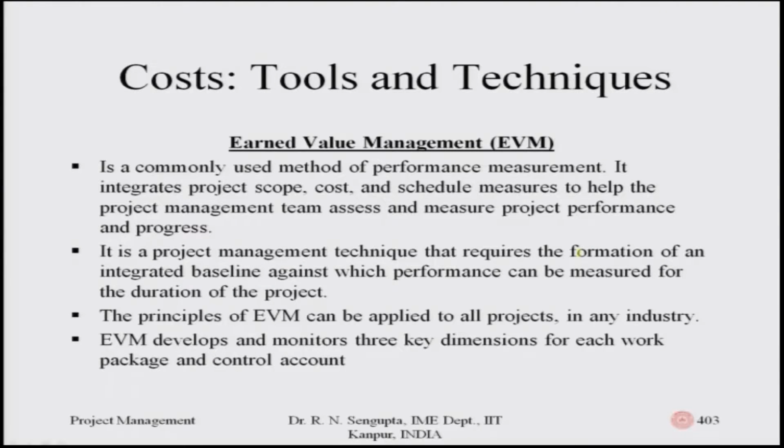It is a project management technique that requires the formation of integrated baselines against which performance can be measured for the duration of the project. The principles of EVM can be applied to all projects in any industry, and based on that we can get both a qualitative as well as quantitative feel of how the work is going on. EVM develops and monitors 3 key dimensions for each work package and control account, such that it is able to analyze the overall project from the cost benefit analysis.